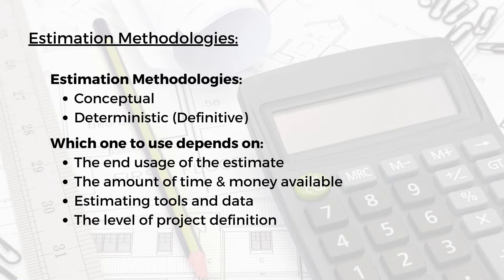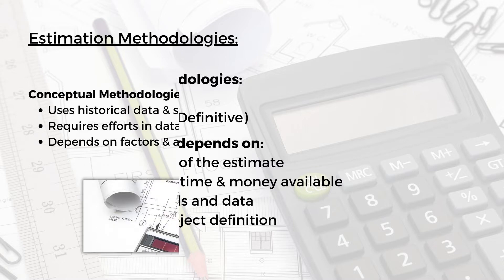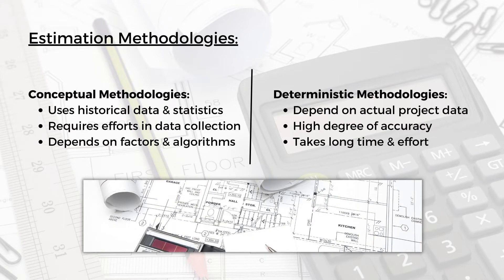The choice of methodology also depends on the amount of time and money available — how many resources you have to quantify everything, get quotations, and so on. Also important are the tools and data available and the level of project definition: do you have specifications, drawings, soil reports, and everything needed to produce a high-accuracy estimate, or just a concept? The level of project definition determines whether you use a conceptual or deterministic methodology.